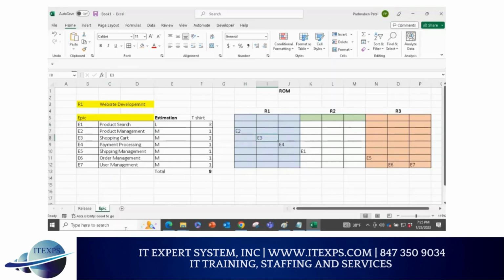So this kind of estimation that we did right now, t-shirt sizes, was this ROM? This is called ROM in industry, rough order of magnitude. This is the practice. We call it t-shirt size. Sometimes we say t-shirt size means like a big brush estimate. Big brush estimate means you don't spend days to do the estimate. You spend weeks or minutes or hours to get the estimate. We still did it logically, right? We didn't just randomly pick. We used epics. We selected t-shirt sizes. We did that, and we came up with that, right?